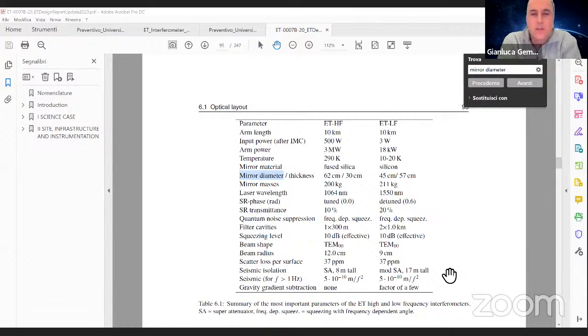Of course, the organization of the ISB is divided in divisions and work packages within each division, but we definitely need to think of the detector as a whole system, and one of the major tasks of the ISB will be the identification and correct handling of the interfaces. And we need to do this soon, because we cannot arrive at a later stage of the design and then discover that we forgot or overlooked some critical interface.